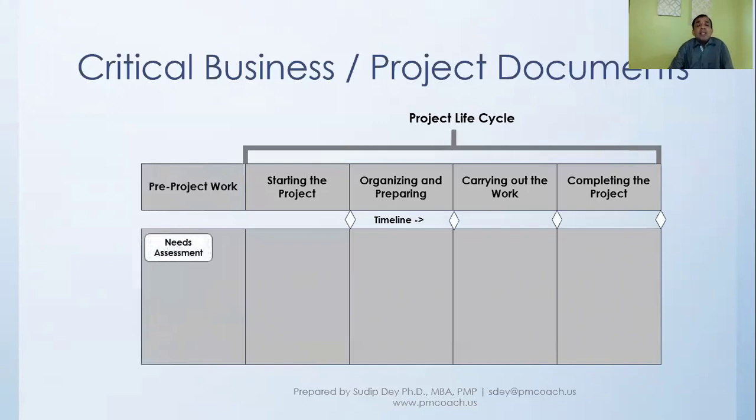There, a needs assessment will be done, and that is typically done by the business, and they will find out what is the need, they assess the needs, and when they assess the need, they'll also put forward a business case. Because if a sponsor, a business needs a project, they will have to justify to the organization, to the senior management, why they need it, what is the purpose, what are they going to gain out of it.